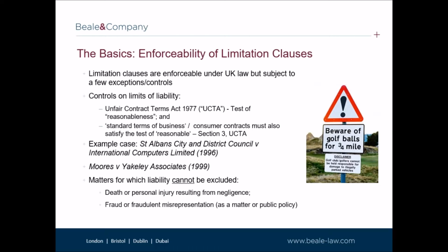The case highlighted that a monetary figure used in a limitation clause cannot simply be chosen at random and must be a figure that can be justified objectively. In deciding the maximum liability a consultant is prepared to accept, the consultant should assess the nature of the risks for each particular project and also the damages that could be payable if the consultant is in breach of contract or is negligent. This will include not only the cost of putting things right, but also all the other losses that could be caused to the client.